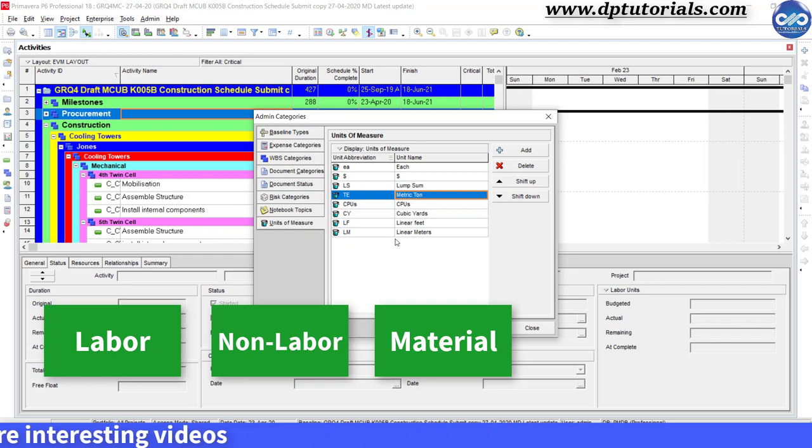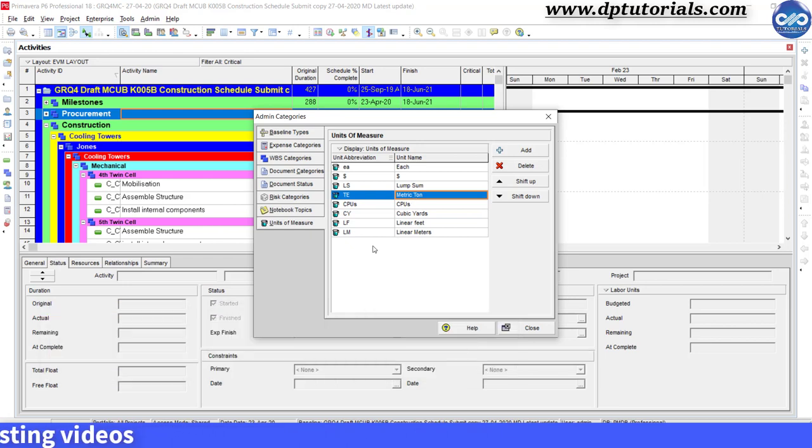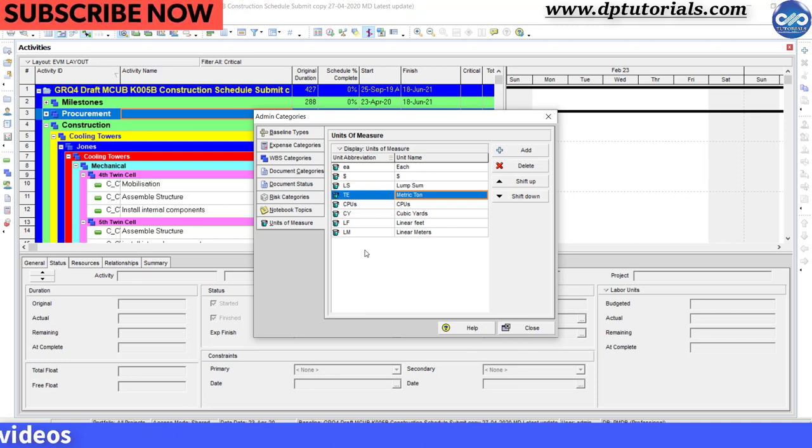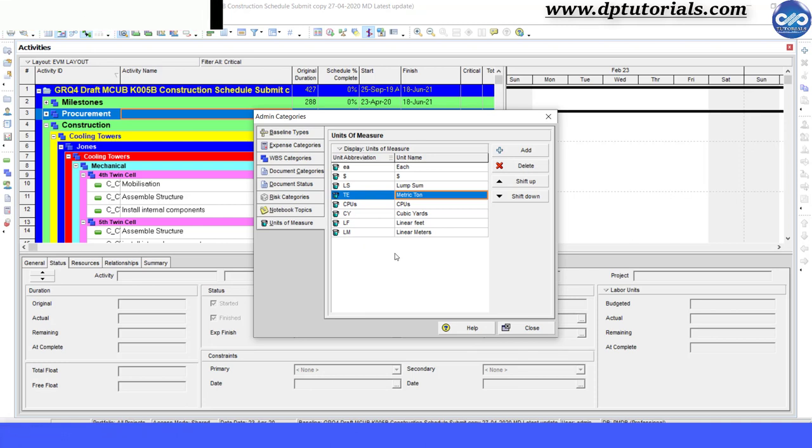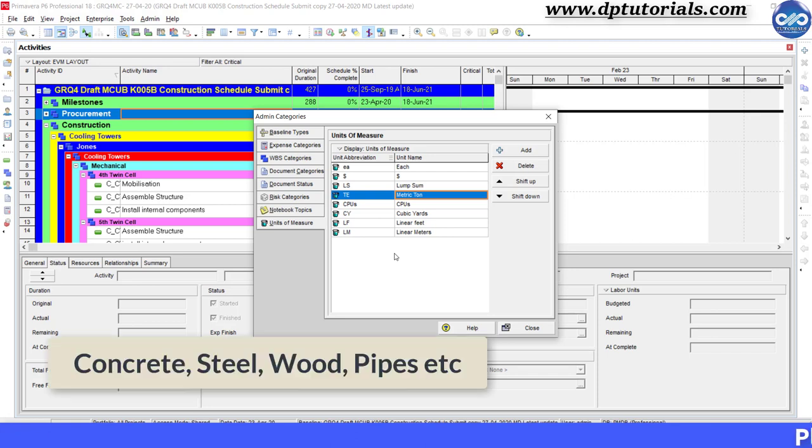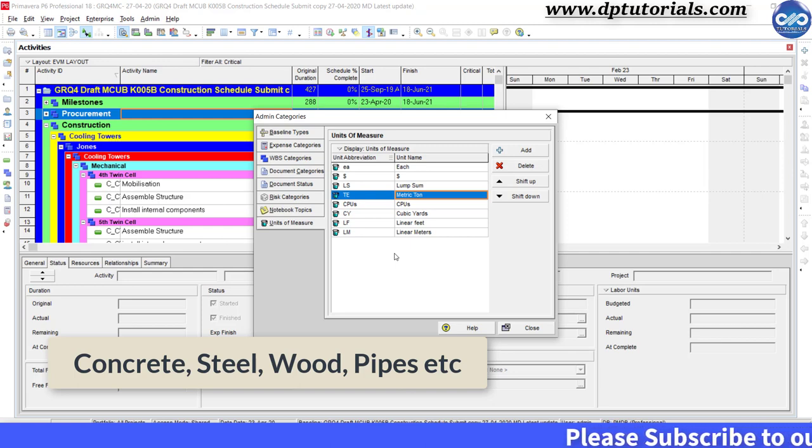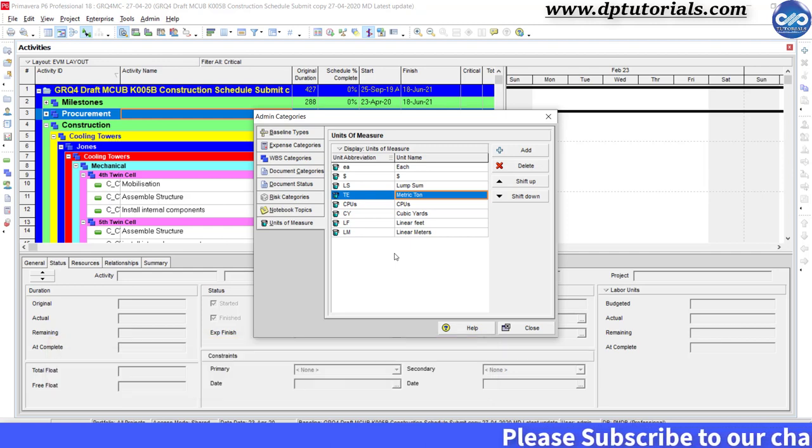So these units of measure are very much required to assign material kind of resources. Some of the examples of material resources are concrete, steel, wood, pipes, etc., whose units of measure differ from each other.